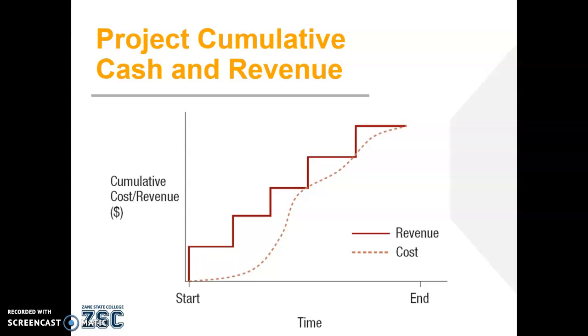It depends on if you are paying cash up front for everything, or perhaps you have a line of credit with your material suppliers where you can pay them at a later time. So it's just something to be aware of, something that a project manager has to look out for. Looking at costs, it's more than just the total dollar amount, but the amount with respect to time throughout the completion of the project.